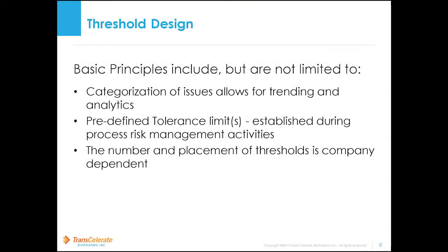Like triage, there are basic principles for threshold design. Categorization of issues allows for trending and analytics. Data from trending and analytics aids in establishing tolerance levels. Thresholds are predefined tolerance limits normally established during process risk management activities. The number and placement of thresholds is company dependent. Upfront planning is key.